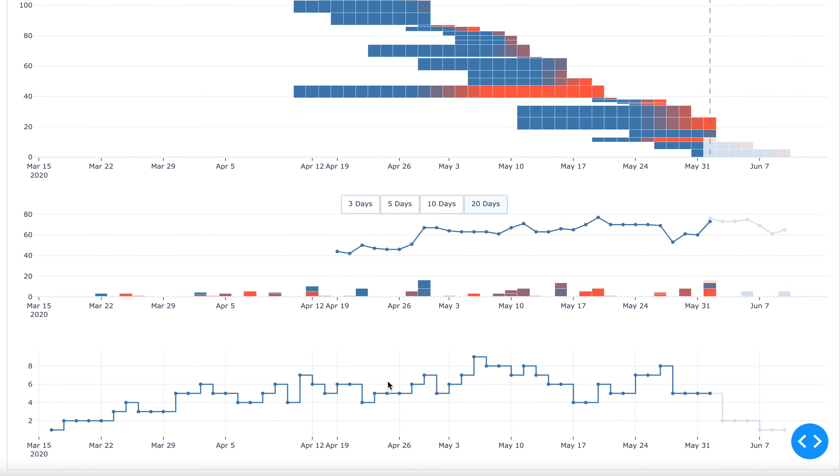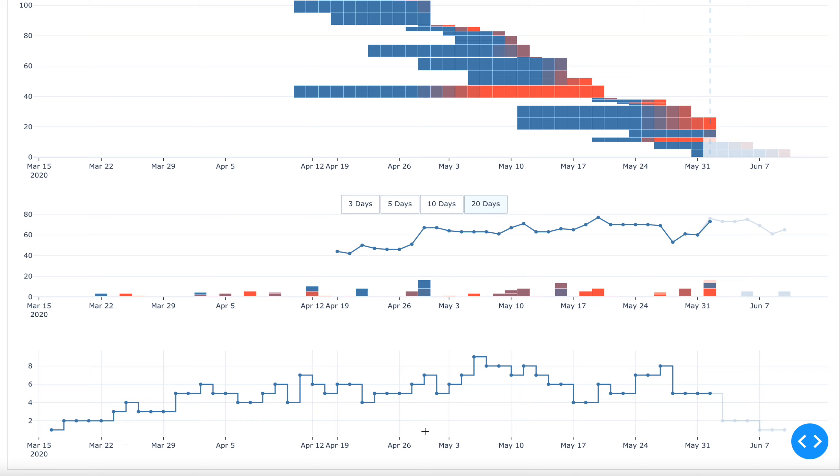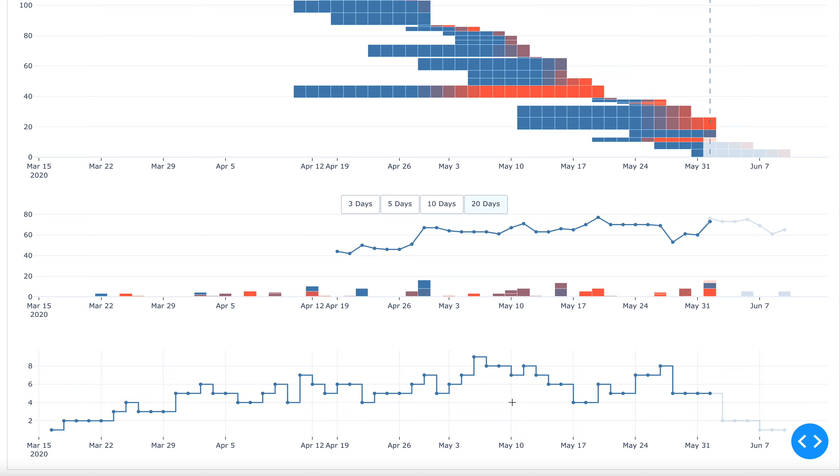And I recently added this graph down here, but this has still needs to prove its worth. I haven't really used it yet. So this basically shows you how many stories are in flight at any point in time. And I think it would be really useful to see this in relation to the actual team size. If this line is significantly above or below the team size, then that probably points to some kind of problem. Either one person has too many stories in flight or one person has either nothing to do or there's some work here that is unaccounted for.